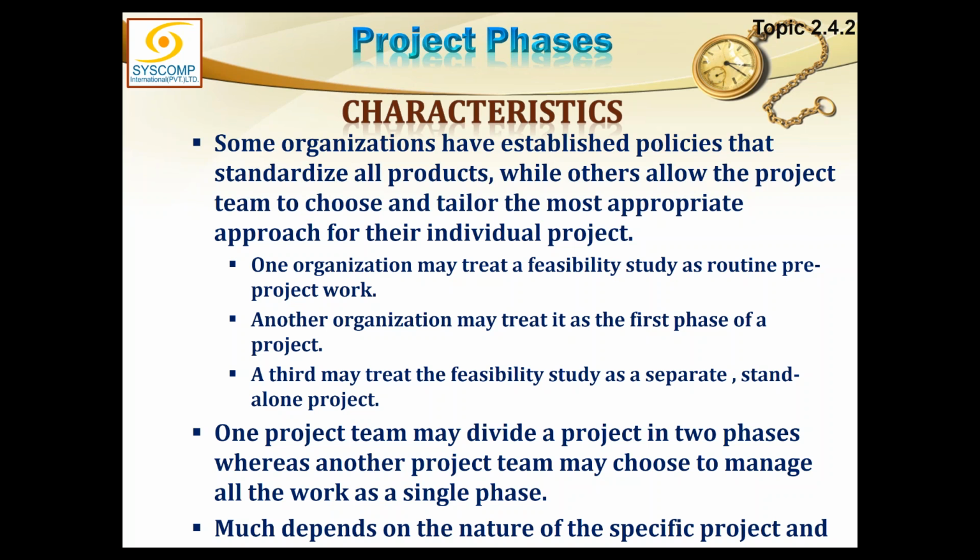Exactly. The interesting part is you can have project, sub-project and phases. You can have project phases and under phases you can have sub-projects. That is more interesting. You might say I am going through a planning phase for all the 5 radars. So this planning phase is the first phase. Then maybe the second phase is physically tuning those radars. In that phase, you have divided it into 5 sub-projects, one after the other, or 5 sub-phases, whatever you want to call them.